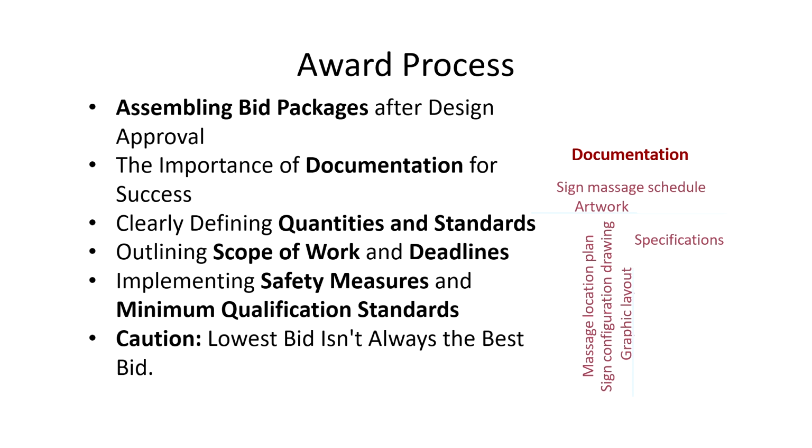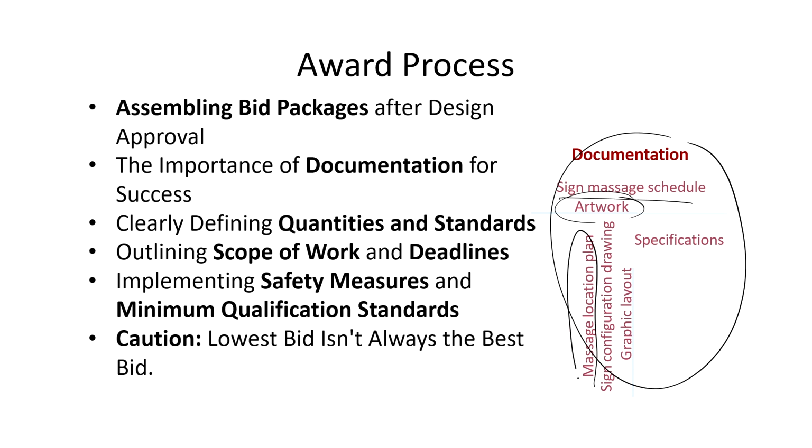The list of the documentation is also mentioned here. The documentation in signage refers to the signage message schedule, if there is any artwork on the signages, the message location plans, signage configuration drawings, the detailed drawings, the graphic layout if any, and the specifications.